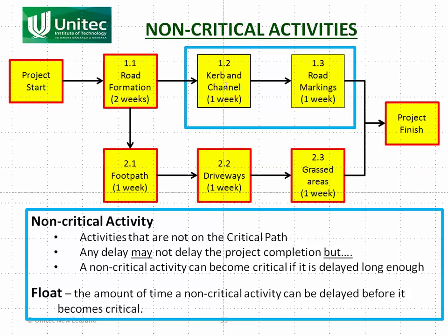However, if say curb and channel was delayed by 2 weeks, then all of a sudden the critical path shifts from the red path to the blue path, and so now the curb and channel becomes a critical activity. So critical activities are flexible.